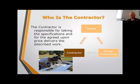So who's the contractor? The contractor is responsible for taking the spec and doing the work, based on the price that they agreed to and the way the specifications show it. And sometimes there's a misunderstanding because the engineer goes out to look at the work to do contract administration on a periodic basis. They're not there all the time. So they're checking the work as it goes on. At a minimum, it's when the invoices come in, to make sure the work was done in general conformance with the contract, but they're not out there all the time.